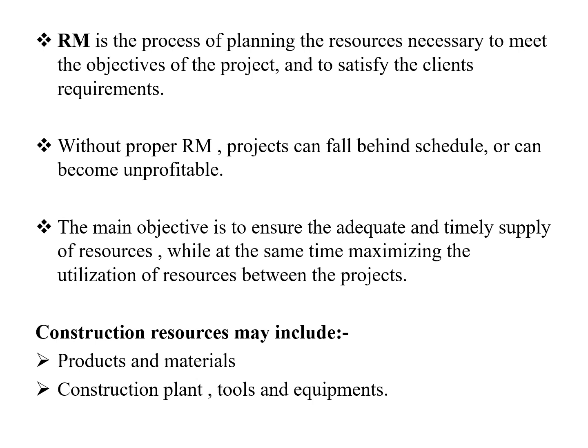The main objective is to ensure the adequate and timely supply of the resources, while at the same time maximizing the utilization of the resources in the project. See, if you want any materials the next day, you cannot make all those resources ready today. You have to order them beforehand, because you will not get them in one day. You should plan beforehand, prepare a budget accordingly and find the estimated cost. Then finally, you should get that material.